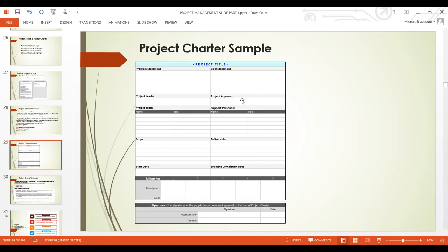If you are going to change from agile methodology to waterfall, you must state a reason once this document has been authorized. So when planning your projects using the project charter, you have to state the methodology you are going to use. If it's agile methodology, you state it here. If it's Six Sigma or Scrum or waterfall, it must be stated. And you are not going to change unless you prepare a change request form.